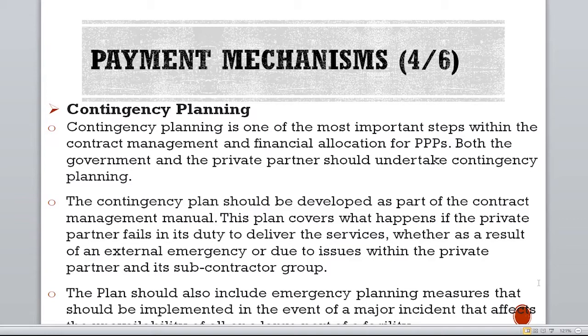So you want to be sure that, should there be socioeconomic instability, this and that, beyond the regular envisaged plans, if you factor it in or make provisions for that, you would not be caught off guard. And sometimes when those are halted, maybe there is a delivery of cement or pre-mixed cement that is already on the way by the time the social instability happened, and all that goes bad. So you want to be very reasonable and realistic so that it takes care of unforeseen circumstances.